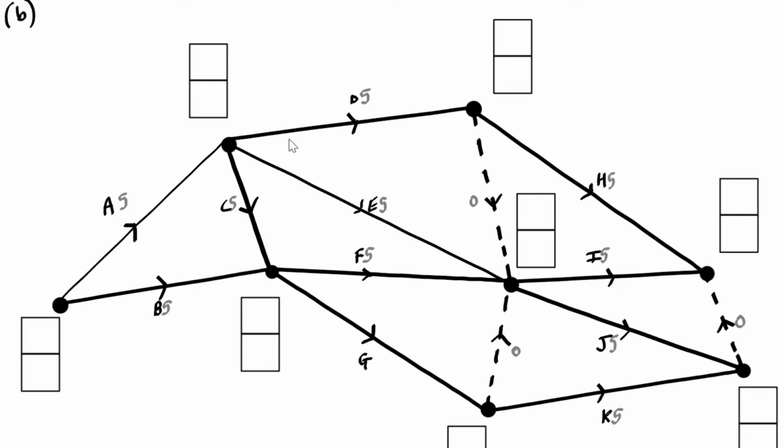So working out the early start times and the late start times, obviously with our source we'll begin with 0. 0 plus 5, that's 5. And then we have 5 plus 5, which is 10. We compare that with the 0 plus 5, which is 5. 10's a bigger one, so we go ahead with 10. Okay? And then we continue through. So we have 5 plus 5, which is 10.